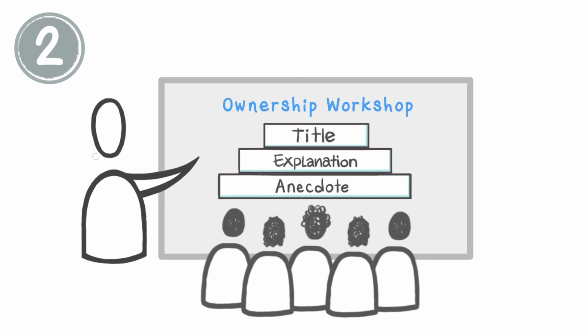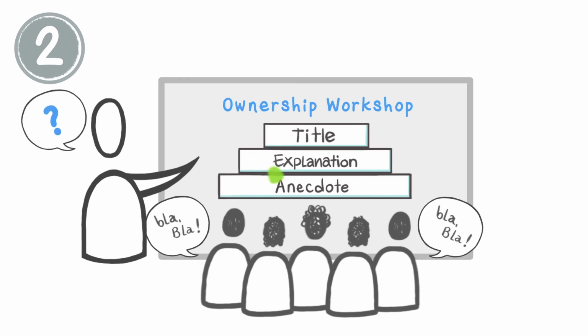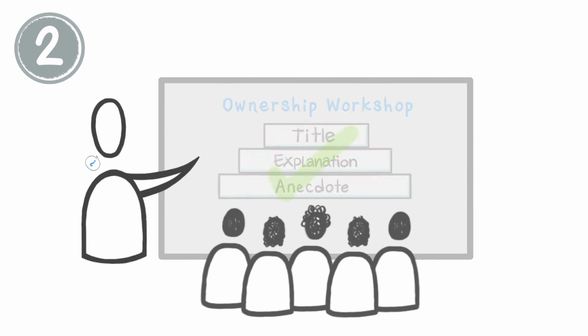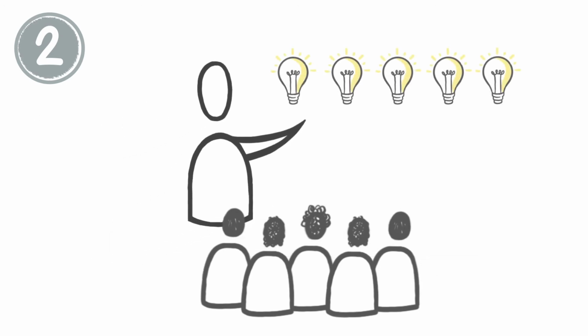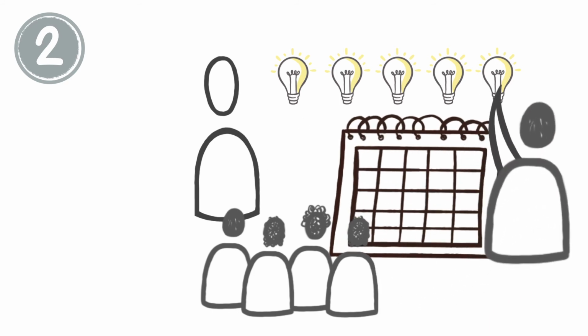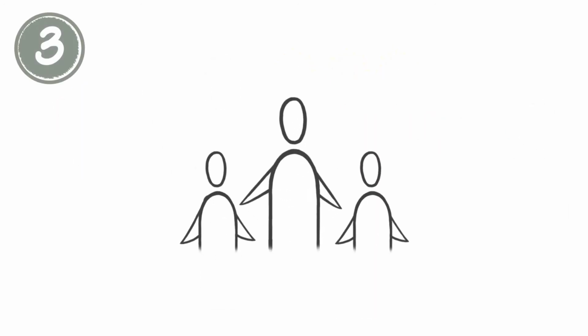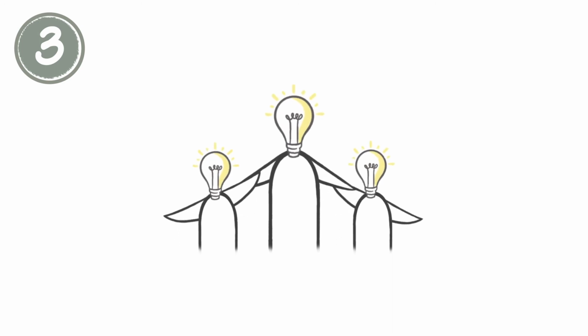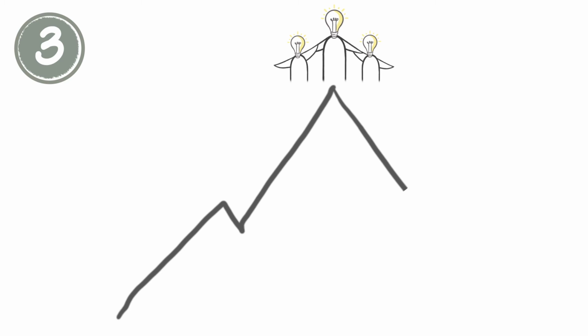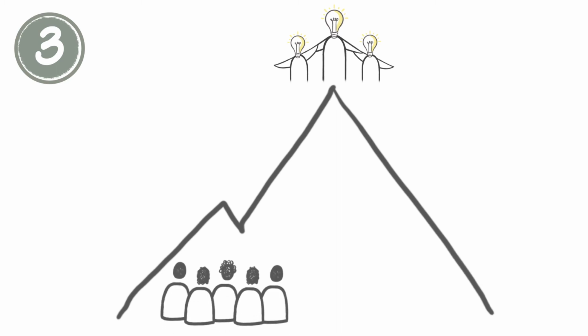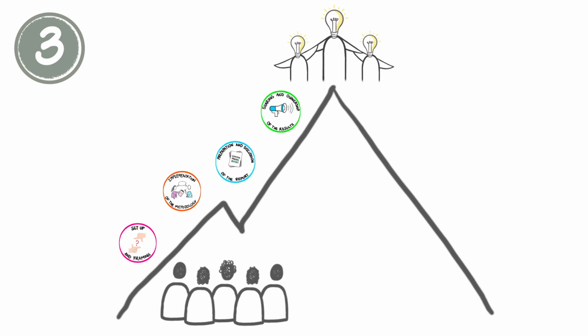The workshop begins with understanding and validating the meaning and context that gave rise to each lesson learnt. Then the participants determine if any of those lessons learnt are useful in the short term, and they finish by incorporating the lesson into some action or strategy in their own work plan. The ownership of lessons learnt through their inclusion in institutional work is the ideal conclusion for the learning process. However, it is the step that deserves the most attention because, despite its apparent simplicity, it has turned out to be one of the greatest challenges in the learning process.